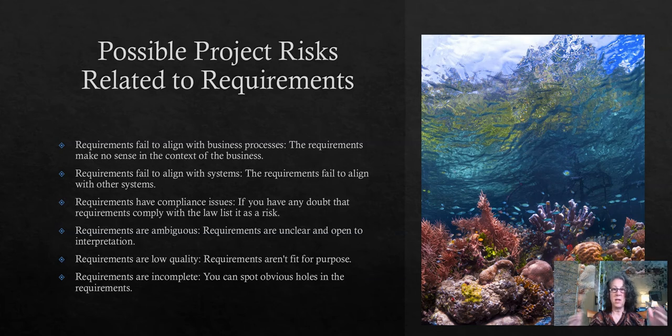Sometimes the response was to create requirements that were really ambiguous. Instead of addressing the lack of agreement across the organizational units, the requirement would be written so vaguely as to apply to them all, but so vaguely stated that no one could actually design and create it because it was so ambiguous.